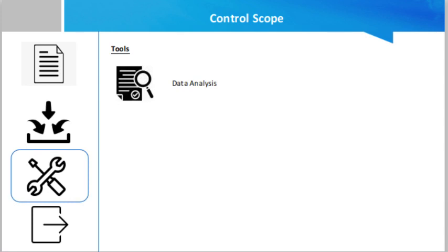Variance analysis is a method used to determine the degree and cause of differences that occur between the project baseline and the actual performance happening during the execution stage. Another is trend analysis. Trend analysis is the method used to examine a project's performance from time to time to see whether the performance of a project is deteriorating or improving.